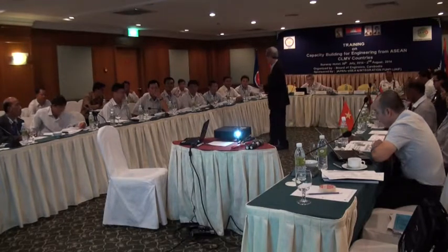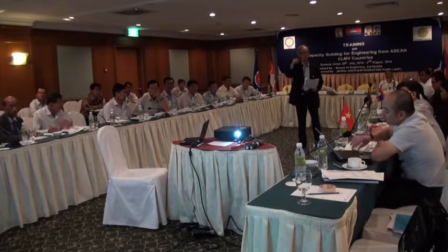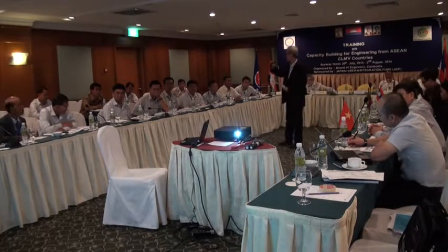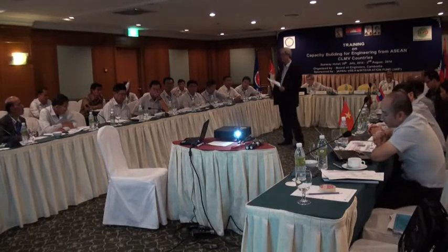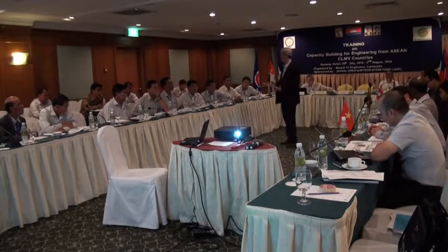Make sure the status report you send to the CEO is how many pages? 1 page, yeah. 1 page. Don't send him many pages. The CEO has no time to read your report. 1 page. So try to use the report I showed you just now. The EVA report, the earned value management report. 1 page only. The CPI, SPI. Send it to him. Yeah. Of course, then you add in at the bottom line, also very important.